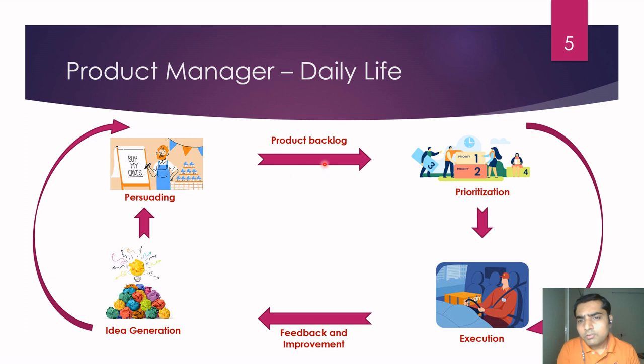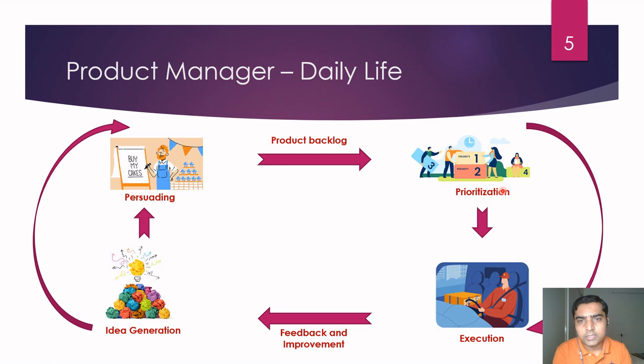We refine the product backlog and define our quarter plan, annual plan, or sprint plan. We don't take all items immediately — we assess what is low-hanging and gives higher value to the customer, which can be taken into the immediate sprint. We also check what backlog is coming from the previous sprint and whether there are customer commitments already made. Considering all these factors, once prioritization is done and sprint plans are defined, we prepare all documentation.